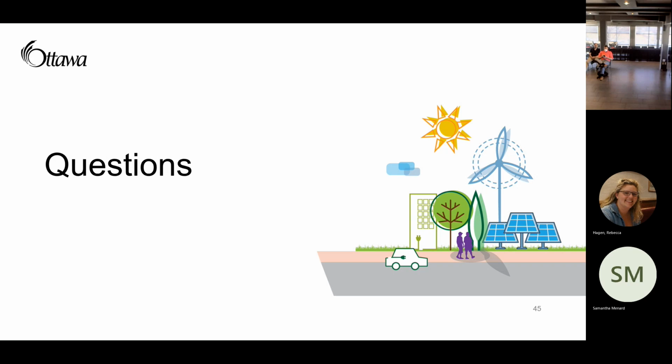So if you're pursuing the reference building, like you're thinking for the prescriptive SB10 approach or for the modeling approach. Okay. Because it's a condition of site plan approval, you could have it just be the same report. You clear your condition, and then, assuming nothing's changed in the time between when you've submitted and you have all the details, you submit that same report to the building code services.